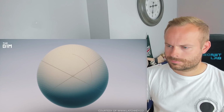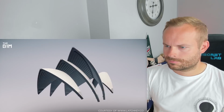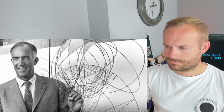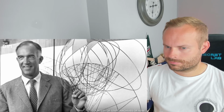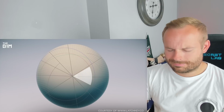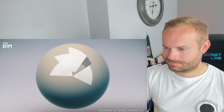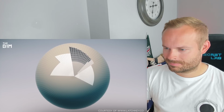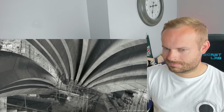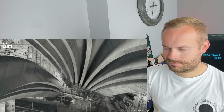Eventually, a solution was reached that would see the curved roof shells cast as sections of a single sphere. While the individual responsible for this breakthrough remains unconfirmed, it is rumoured that Utzon himself came up with the solution while peeling an orange. By treating each shell as sections of one sphere, arches of varying lengths were able to be cast in a common mould. In total, more than 2,400 precast ribs and 4,000 roof panels were manufactured this way in an on-site factory.